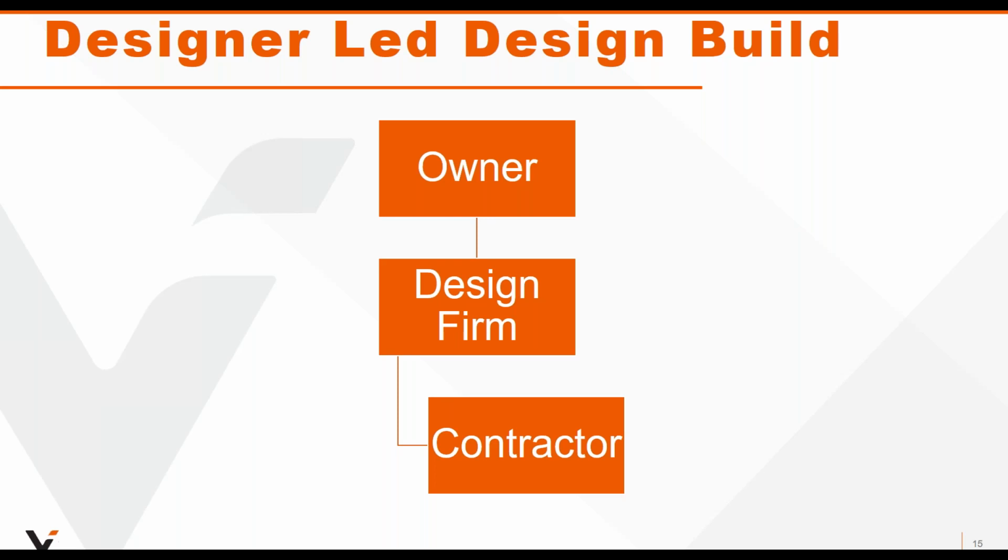Again, I looked at our case files. I saw one or two. But what I did see in this particular scenario is that the damages really tend to be large if you are indeed the lead. What you often see as allegations are delay claims by the owner that often lead to substantial damages, as well as allegations of both defective design and construction.